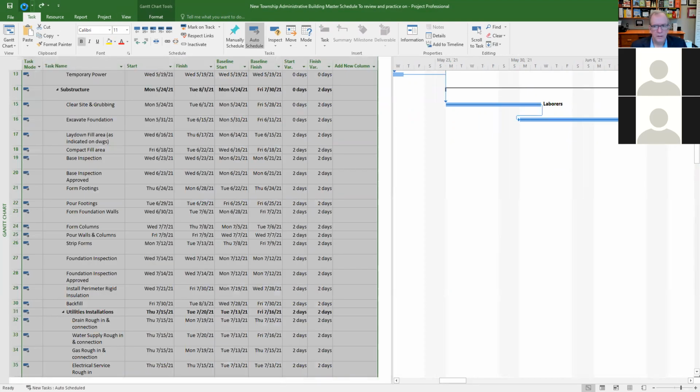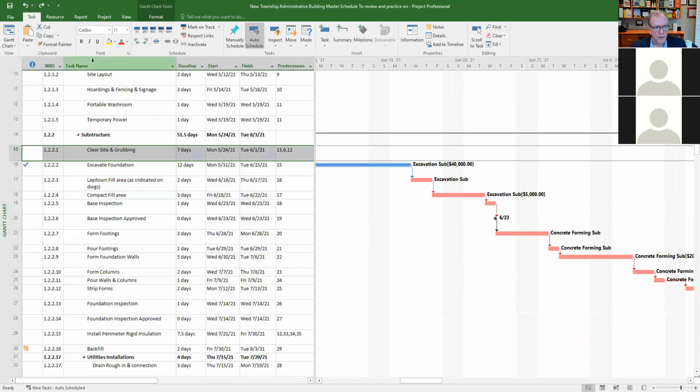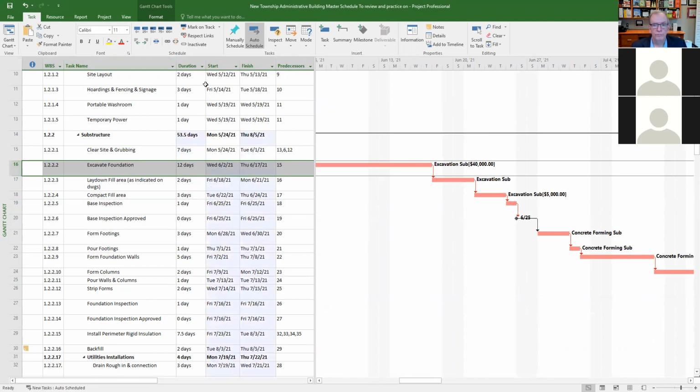Okay. Other question? Just going back to that, you don't typically want a task inserted saying like delay 1 and then listing out the delay? No. No, you just delay those tasks and then say that they're delayed. That's all. And then just give the reason.